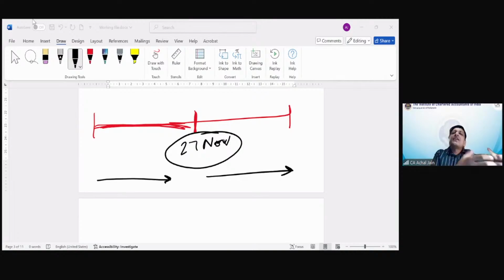Okay. The objective of this cost is not the construction. The objective is the sale, the saleability. Yes or no? So therefore, marketing is not incurred in relation to the construction, and that's why it's been kept out of this purview. Of course, because it's a cost, it will also be charged, but it will not form part of the construction costs for the purposes of consideration of AS 7.